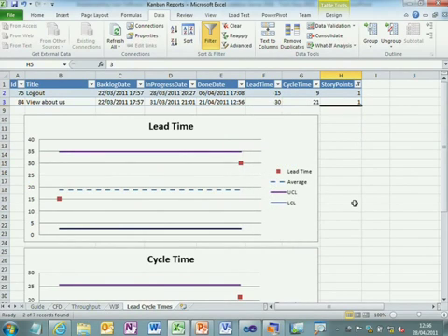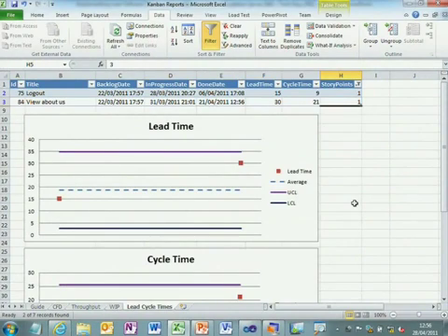How predictable are we on one user story? And it's made up data, so it's terrible that it takes 30 days to do some one user story point things. But you can see that you can use the relational database to pull back this type of information and calculate those backlog dates, the date it went into the backlog, the in-progress date, and the date that it was actually done.